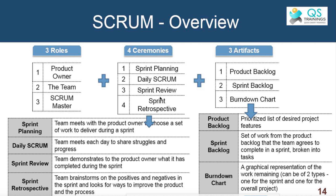Then there is the daily scrum meeting. Every day, for 15 minutes, the team meets at the same place and same time to answer three questions: What did you do since yesterday? What are you planning to do before the next meeting tomorrow, same place, same time? And are there any impediments or roadblocks coming in the way? That is your daily stand-up or daily scrum meeting.